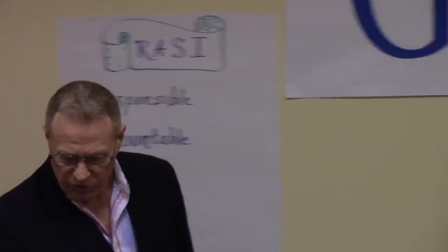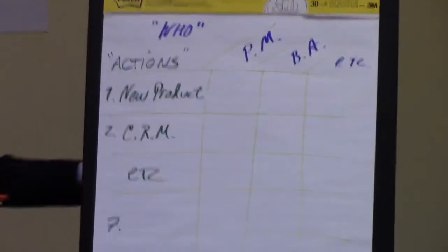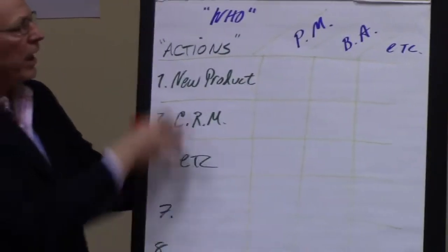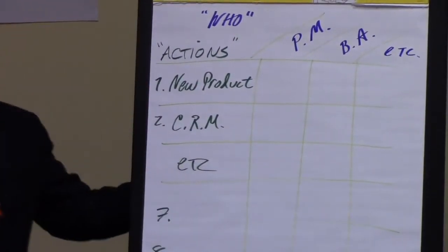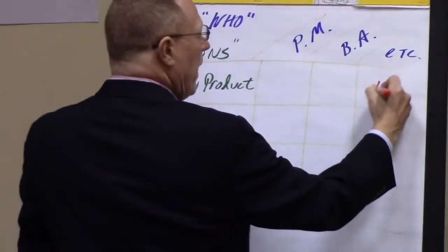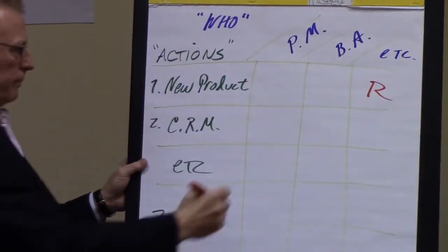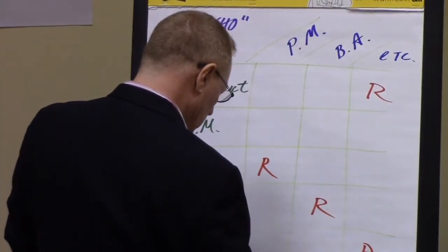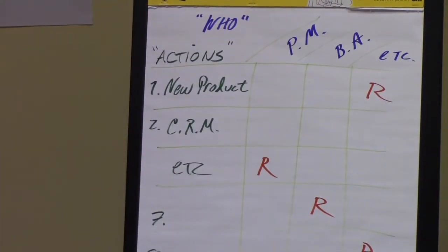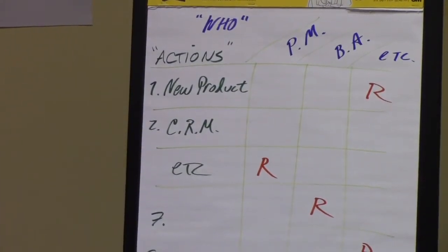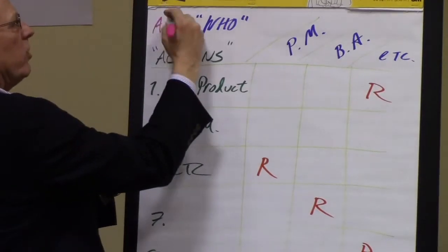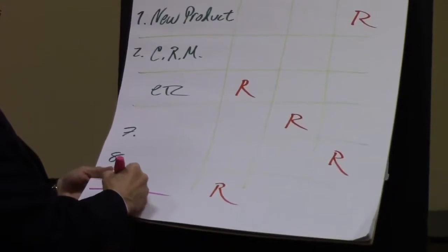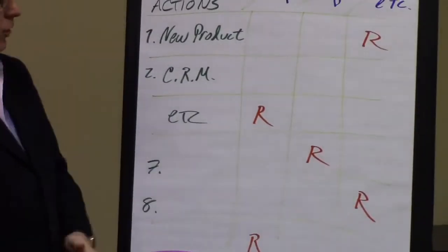Leveraging those symbols, the suggestion for most methodologies is to make sure you work in a vertical fashion so that in case the meeting ends, we at least leave the room knowing who's going to be responsible for each of these. And that uses what's called the big red R. Now, if in fact there's one person paying for it all, just a good idea to footnote that, and frequently that is the case. If there are separate groups or business units accountable, you can mention those accordingly.